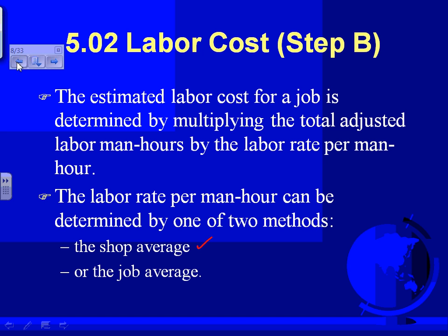So, for example, in the month of April, you paid them $14,200, and their hours were 1,166, and so that gave you a rate of 12.18. In May, June, July, August, September, 6 months, keep the track of their hours and dollars for 6 months. Then you added all their dollars, divided it by all their hours, and you came up with 10.65.